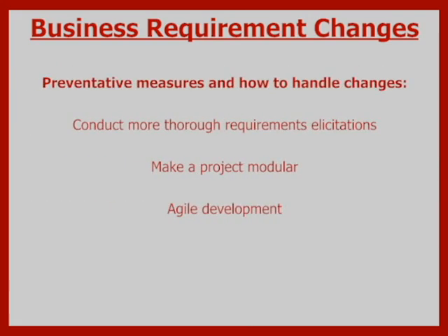Designing the software to be modular can prevent sweeping changes to a project. Prevention is the best approach. It won't be a problem if it doesn't happen. Thorough requirements elicitation can reveal requirements that are hidden but may appear later. The aim is to hopefully cut down on the more casual email chains of, "Oh, another thing I thought would be cool." However, a developer can only do so much elicitation to solidify what the requirements are, but the problem is that sometimes the unknown and new problems are actually the least threatening.